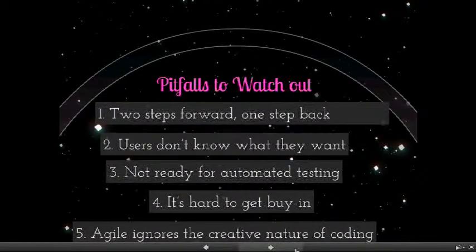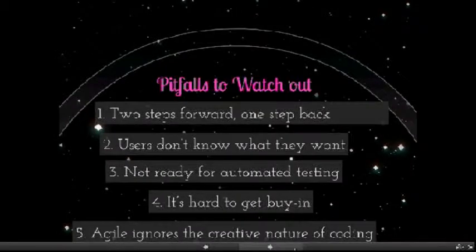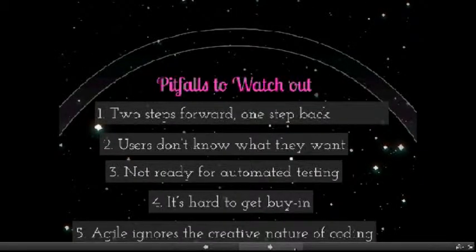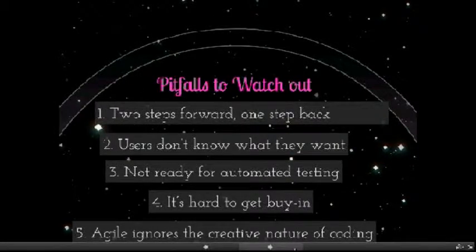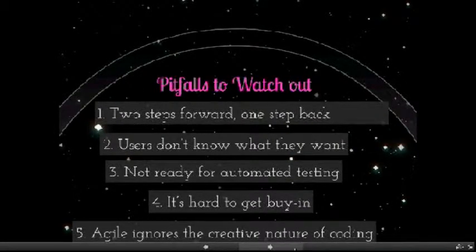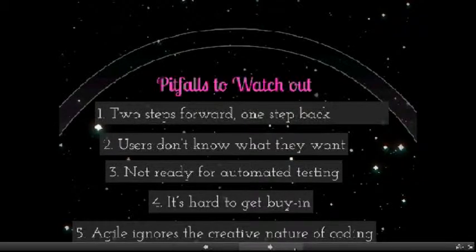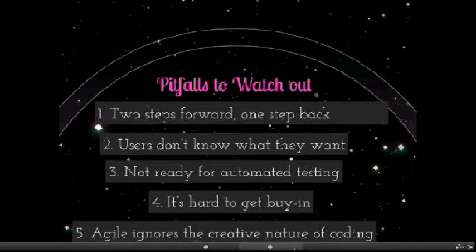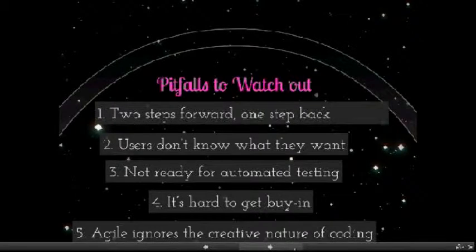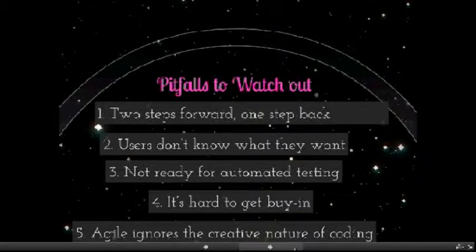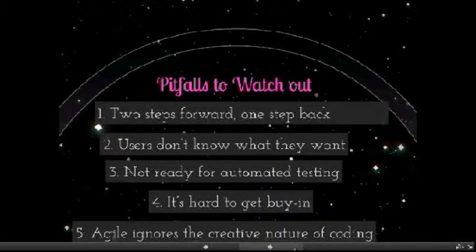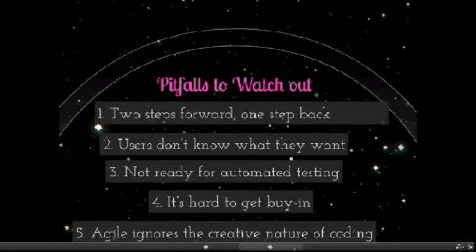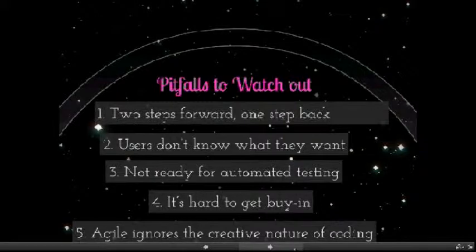There are five major pitfalls you should watch out if you are using agile development for software development projects. Two steps forward, one step back. Agile breaks down projects into iterations that deliver potentially workable software within two to four weeks. The scope of what is being delivered from iteration to iteration can vary dramatically based on feedback from users. And sometimes the users don't know what they want.